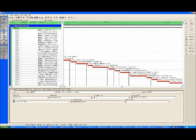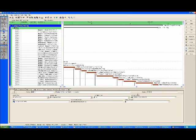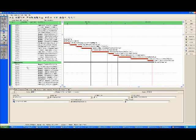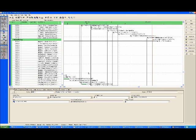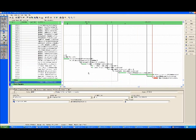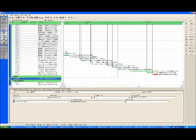And you can see that milling is the critical path everywhere. And then after milling, the adjustments can begin. And then after the adjustments are finished, the resurfacing can take over. And the last street to be done is the Abbey Place, which turns out it's also a point repair, and this is the finish start relationship for the water management activity that has to precede the milling associated with Abbey Place.